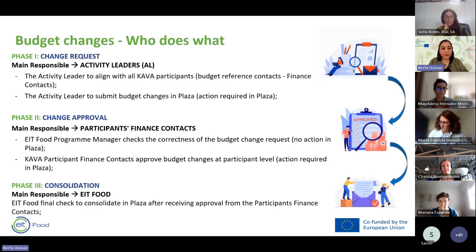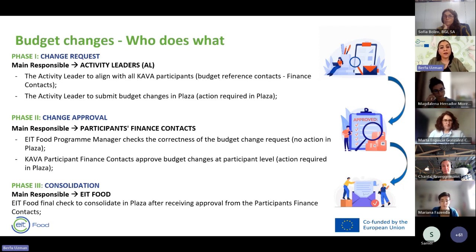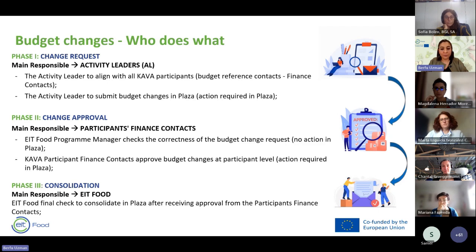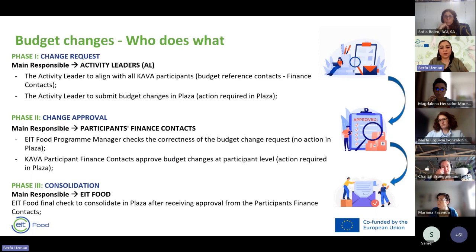The third phase is the consolidation phase, where EIT Food has final responsibility. My colleagues will perform the final check to consolidate the figures in Plaza, but they will wait for approval from the participants' finance contacts. It is important to keep an eye on deadlines — once Activity Leaders submit budget changes, it would be great if finance contacts can act quickly so the process can be finalized.